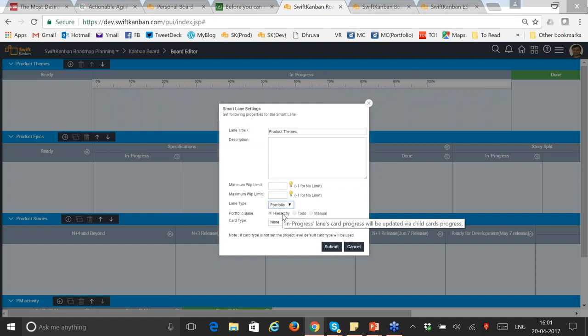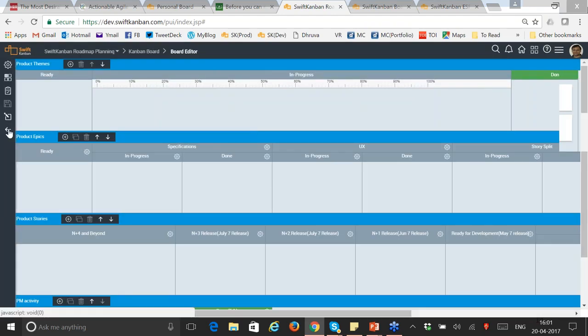Unlike Microsoft Project, where somebody would say they are subjectively 90% or 80% complete, and then the 90-10 syndrome applies, here you're going purely on the basis of card completion, so there is no ambiguity. Once a card is done, it is done, and you are able to see the exact progress.